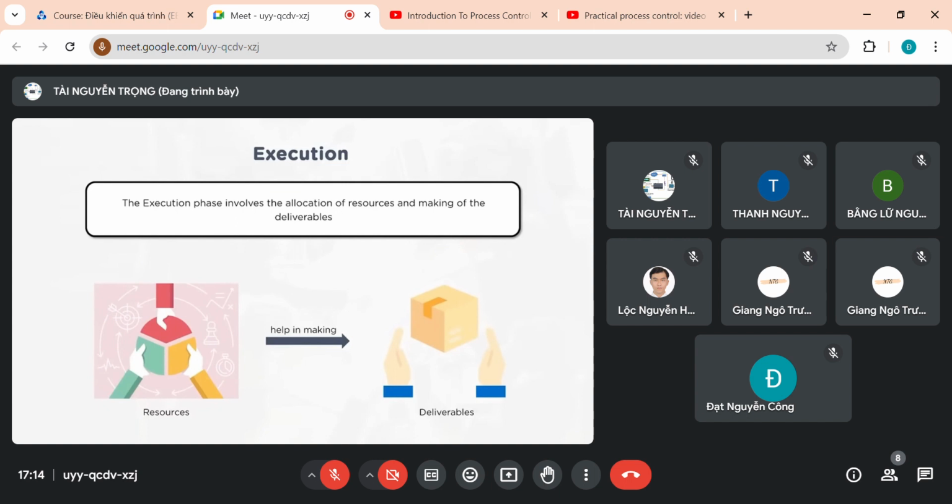Product scope is all about ensuring the features and functionality of the product are well defined, understood and signed off. And while delivering that product, it is tested against those defined features and functionalities. Whereas project scope focuses on all the activities that need to be done, all the templates which have to be used, all the processes which have to be complied with, and all the skills which are required to be applied. So it is going as defined.